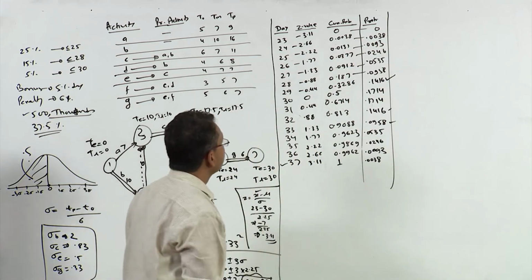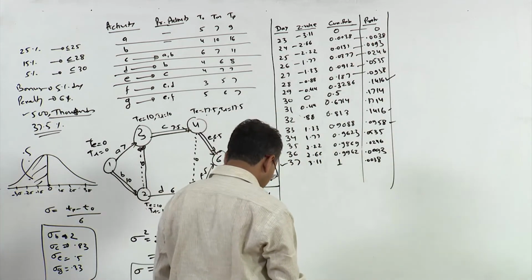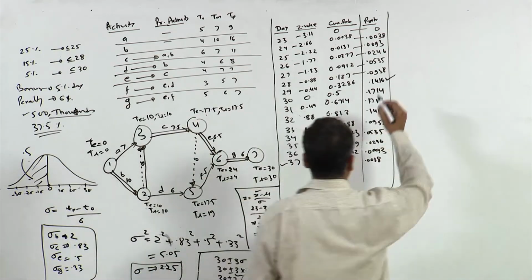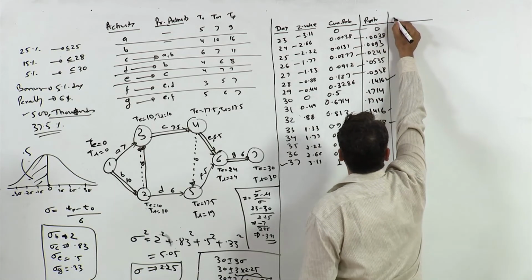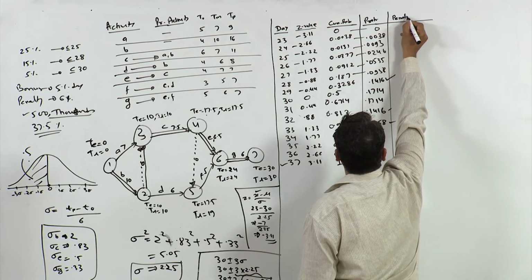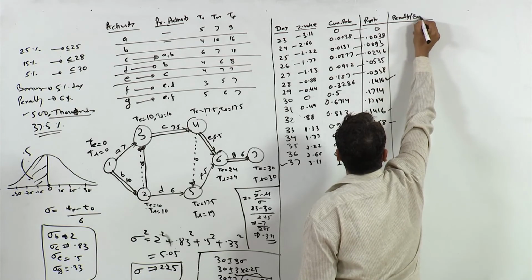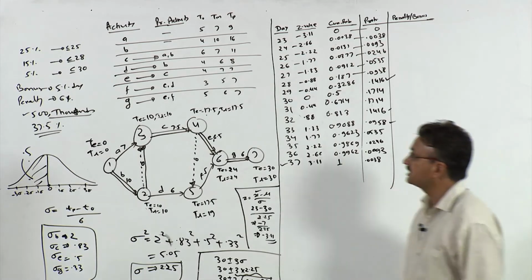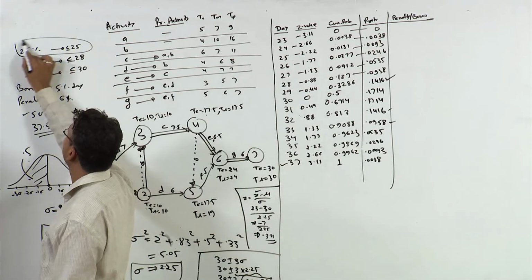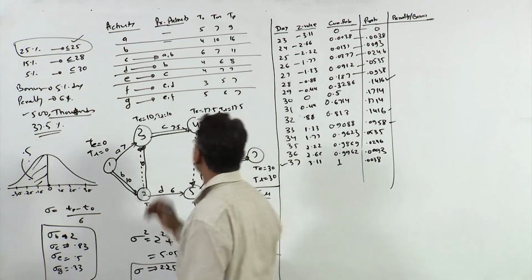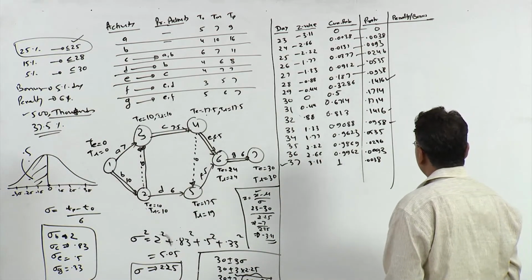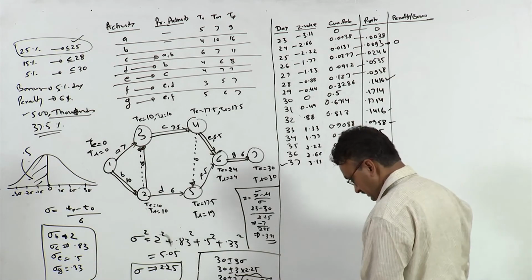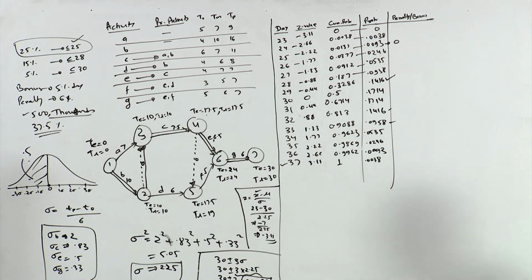Right. Now since you know these are the probabilities, let us calculate whether you would be getting a bonus or there would be a penalty. So, penalty or bonus. As I have said, we are doing this calculation for this particular quotation, when we quote 25 or less than 25 days. So when we complete this project on the 25th day, there won't be any bonus or any penalty.